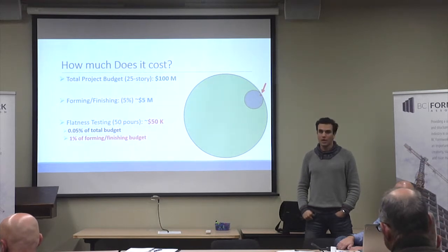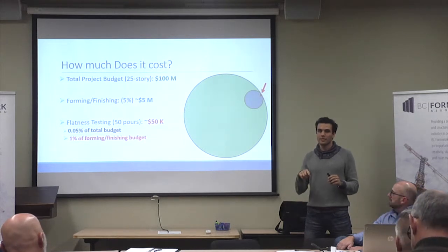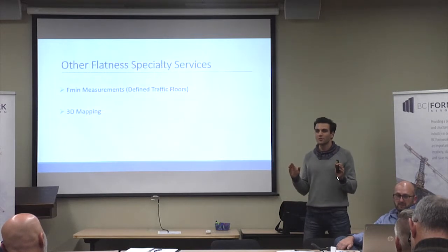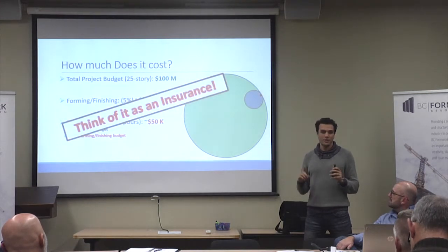Exactly. So just so you guys are aware, what we are doing right now as a kind of backburner research and development program is testing FF/FL. We are comparing with straight edge testing whether or not one table, which is in the 2009 version of CSA, is accurate, which we believe is not. Over there, it says 1/4 inch over 10 feet is equivalent to 25/20.